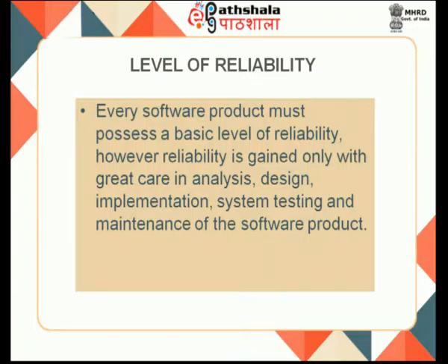Now let us understand an alternative scenario. We act as clients and pose the same problem to a company. In the business of developing software for specific clients, though there is no standard productivity figure and it varies a lot, it is fair to say a productivity figure of 1,000 lines of code per person month is quite respectable. So 1,000 lines of code per person month is most respectable.